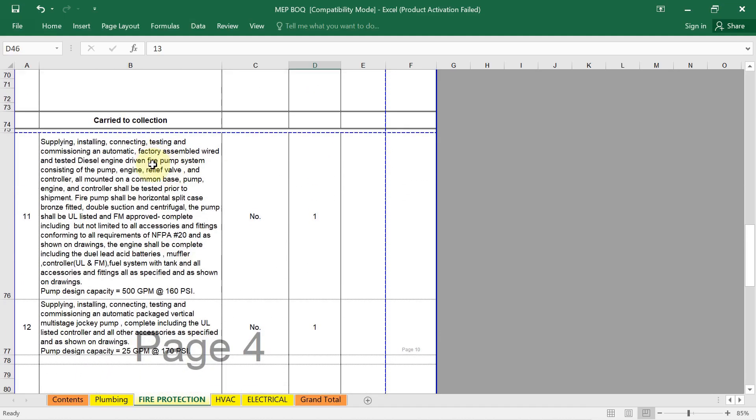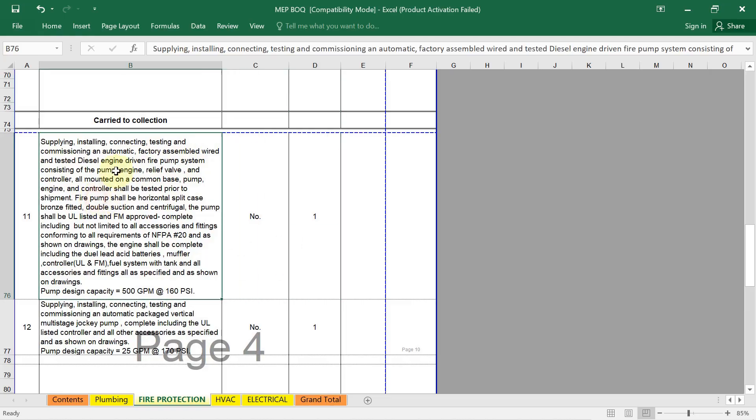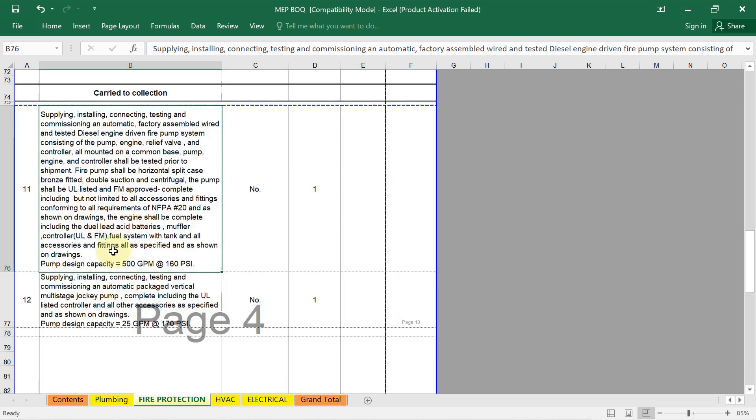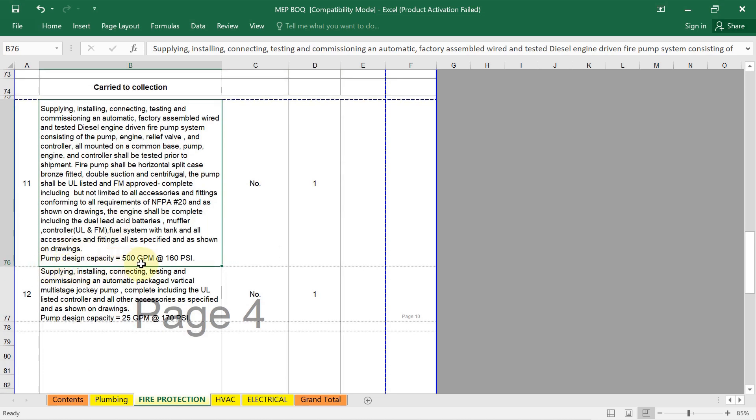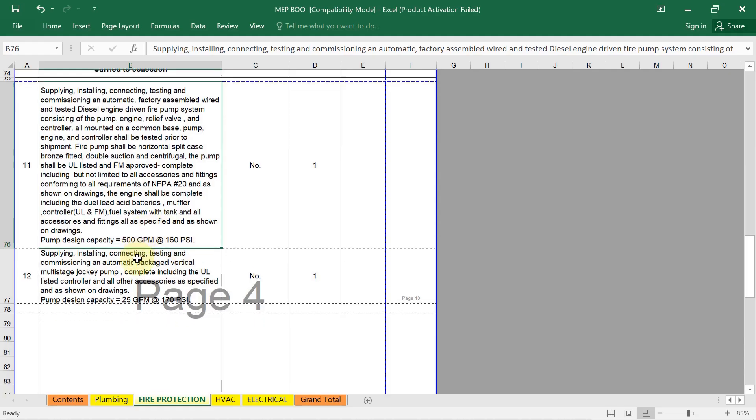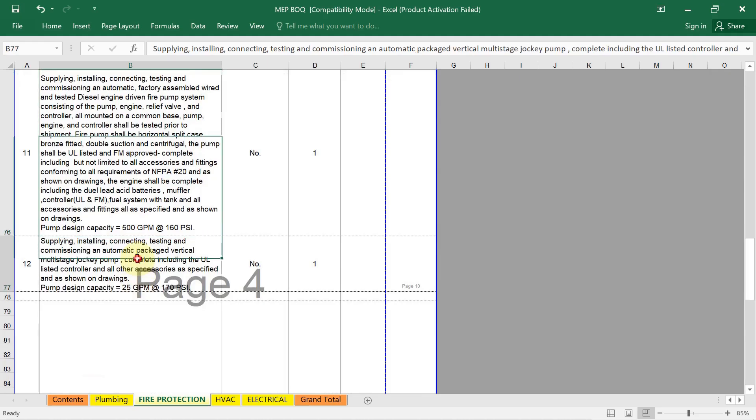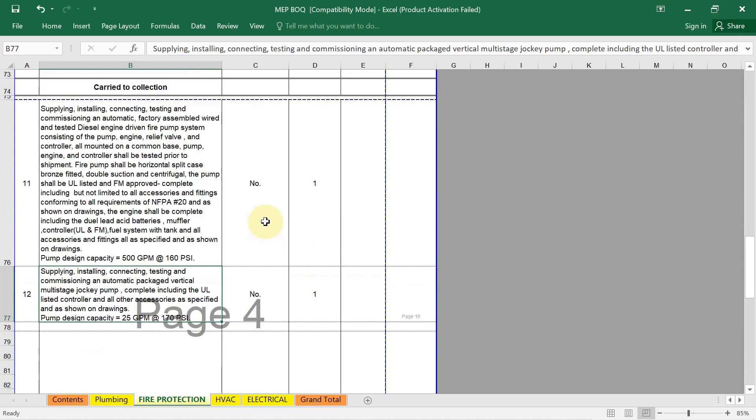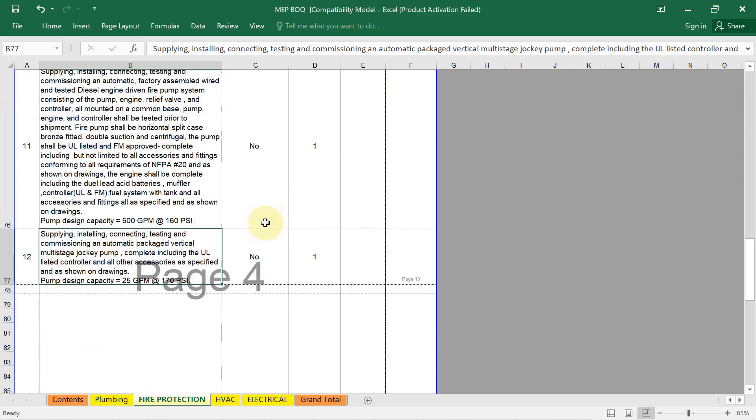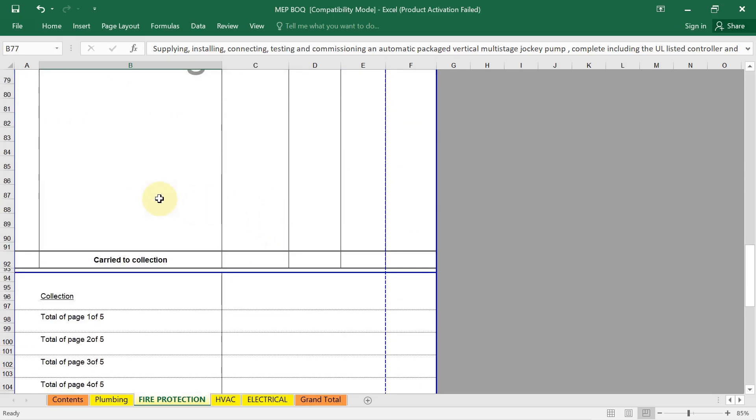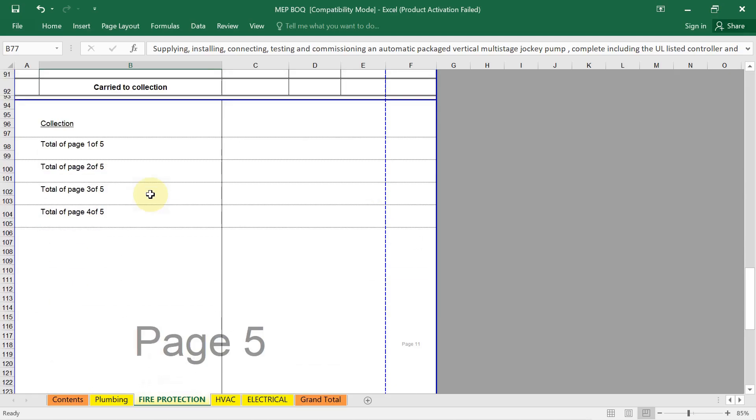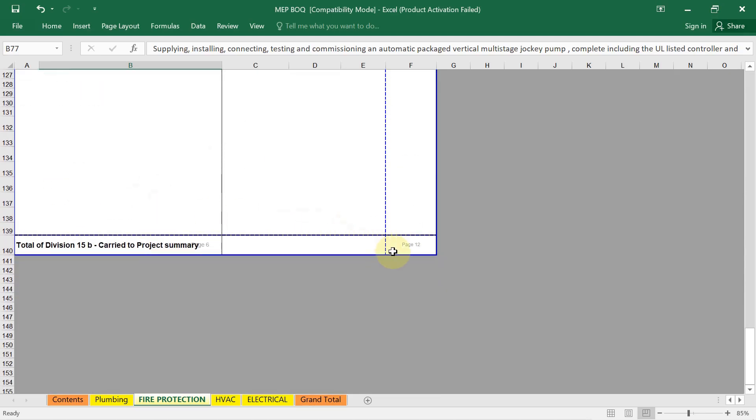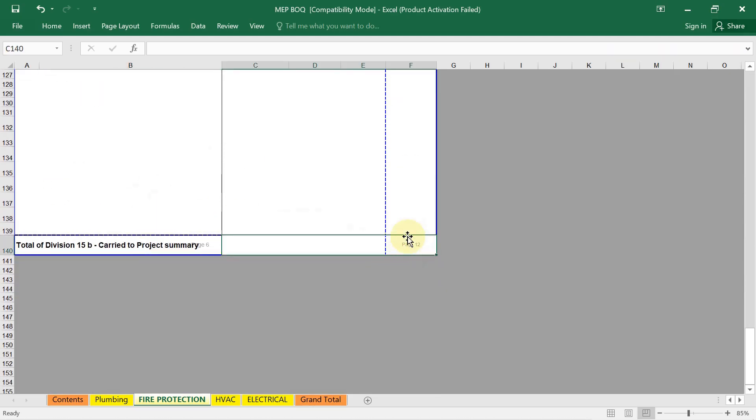Next, here you can see the supply, installing, connecting, testing and commissioning. Wired and tested diesel engine driven fire pump, if you are using, their quantity in description. We need detail: what is the pump design capacity, water flow rate, pressure value, pump head value, it is needed here. Same way, here you can see the jockey pump, if you are using, their quantities. Electrical pumps, if you are using their quantity, everything. Finally, here you will get the total amount.